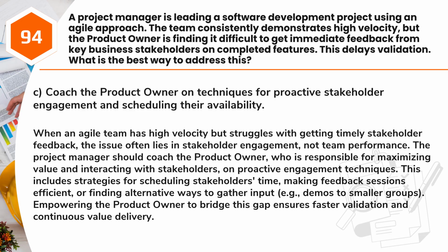This includes strategies for scheduling stakeholders' time, making feedback sessions efficient, or finding alternative ways to gather input, e.g., demos to smaller groups. Empowering the product owner to bridge this gap ensures faster validation and continuous value delivery.